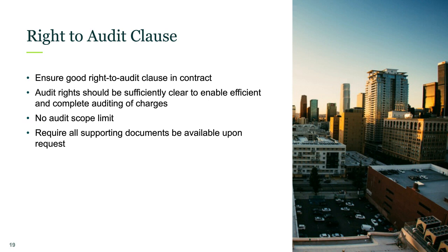For those of you who already have existing contracts with the right to audit clause within your contracts, exercising your right before retention is paid, as long as your contract allows for that, which they typically do, is critical to achieving the savings. Once the payment has been made, it's harder to get it back. I find based off experience, and I'll repeat this one more time, if you have the right to audit clause, exercise it before final payment is made if your contract allows for that. Once the final payment is made, it's harder to get it back.